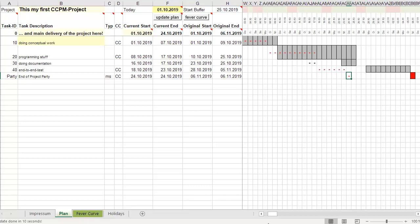The assumption is that always something's happening in the project execution, so you will consume over time your buffer. If the project ends, you will have consumed all the buffer, but you will reach the due date. If one work package is earlier than expected, it saves buffer. If something is happening in another, it consumes buffer.